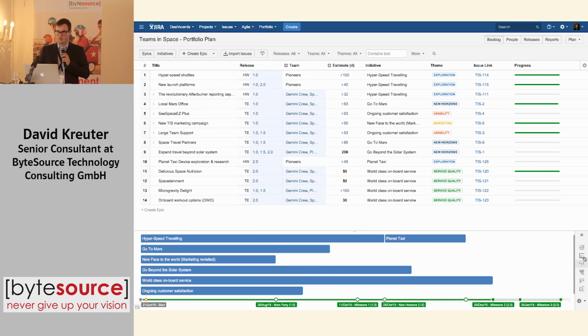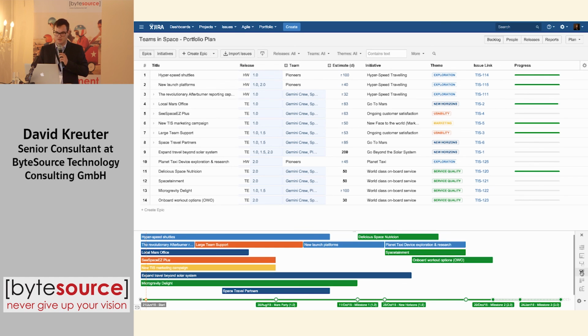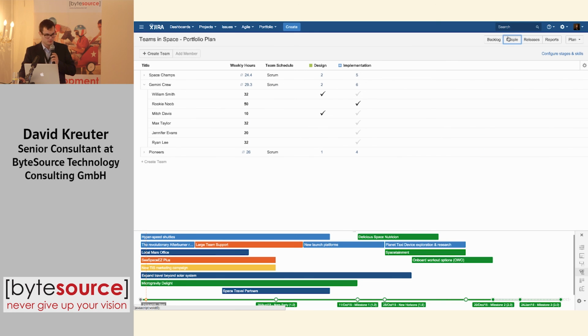So I can enter here my fixed release date. Let's say in 2 months I have to release some new feature. And what about my capacities? Do I have this capacity? Do I need additional resources for this? This is what you can do in Portfolio. So it's also including resource planning. So my people, my teams. We have here 2 teams. They are responsible for different milestones.